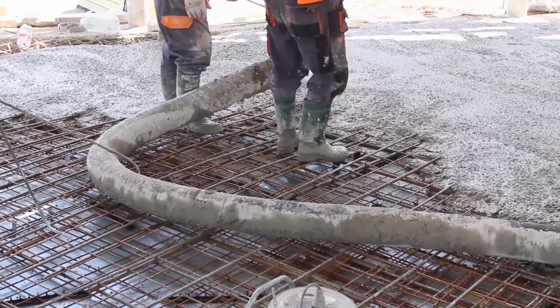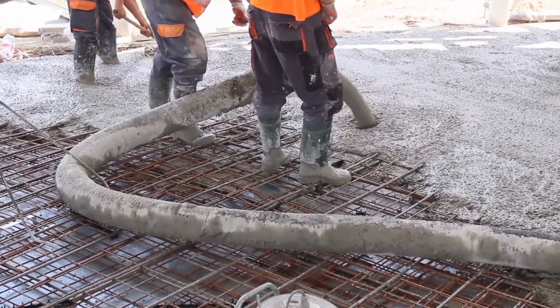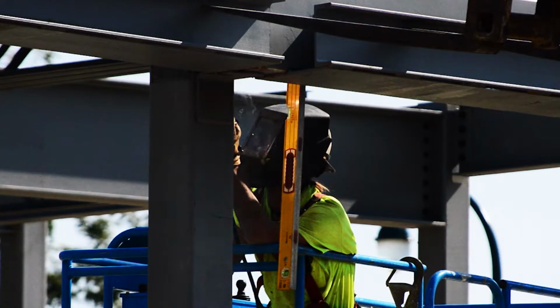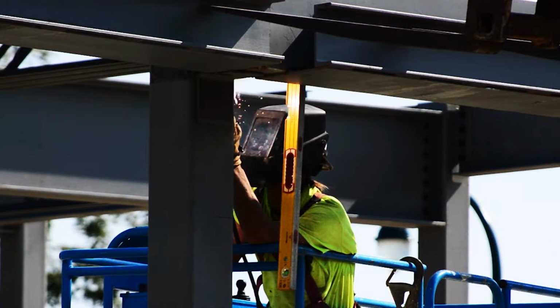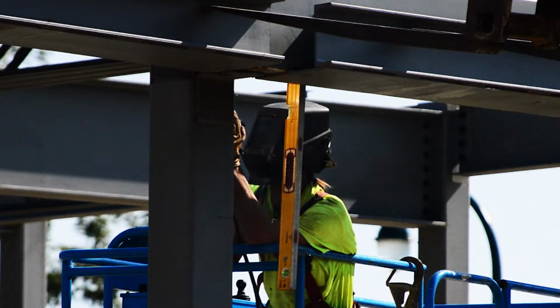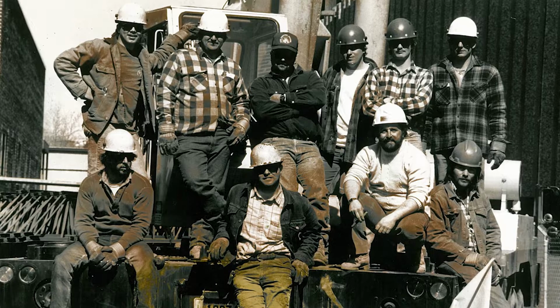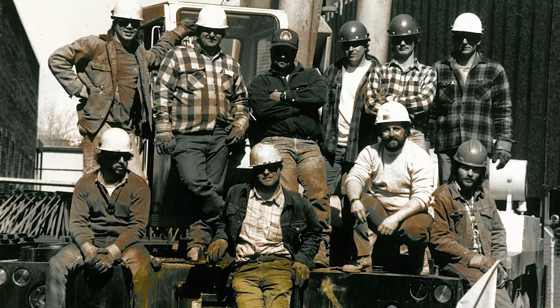To keep construction moving forward, we have 2 options. Option 1, install the beams as directed by our customer with a guess as to the location and then deck over the floor or roof so other trades, such as a concrete contractor, can continue their work. This certainly leaves a cost exposure if we have to move these beams later. This cost can be substantial considering all of this work has to be done from underneath and above our iron workers' heads, which is an added concern for safety that wouldn't be present if the information was provided at the beginning. Option 2 is we could halt all production until we are given mechanical specs.